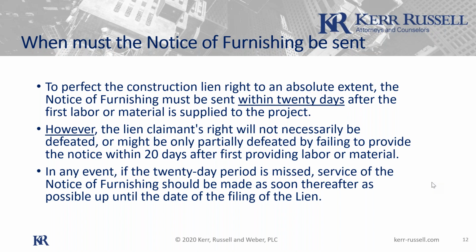And this notice of furnishing thing is one of those yellow lights. I would like for you to all be perfect and always send it out timely. But I'm kind of realistic in my experience. It doesn't happen all the time. And if you fail to do it, this is one of those that I would call a yellow light rather than a red light. Remember, the only red light is the 90-day period after last work that you have to file the claim of lien in.